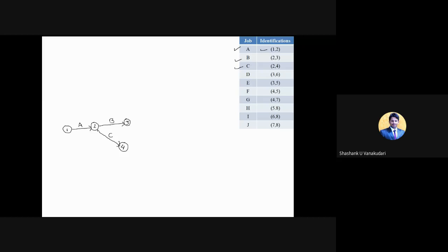And the fourth one is activity D that connects 3 to 6. So I am drawing in this way. So this is 3 to 6 that connects activity D. Okay. So for every activity, it should have an arrow. Make sure that you need to provide an arrow for each and every activity. Okay. So now the fourth condition is satisfied.